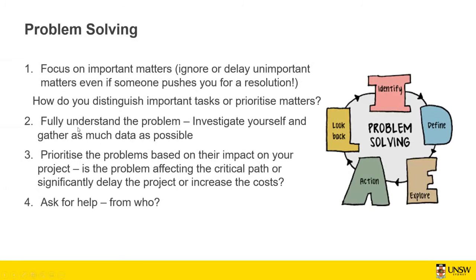Fully understand the problem, investigate yourself, and gather as much data as possible. Don't run into action before you have all the information. If you're behind schedule, don't just instantly do some kind of crashing, rescheduling, or cost saving. First of all, see what the exact problem is and what would be the best solution. Maybe you can have a brainstorming meeting with some of the staff or some of the stakeholders to see what would be the best possible scenario in order to get things on track.